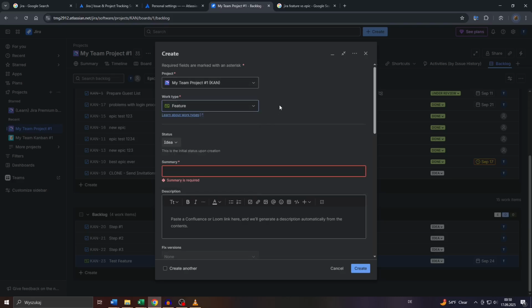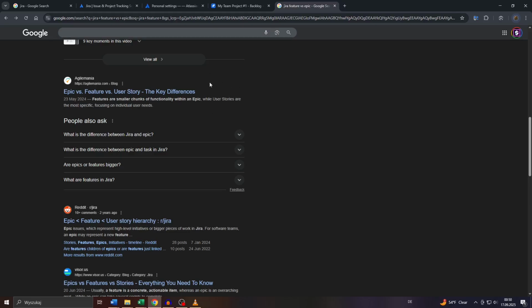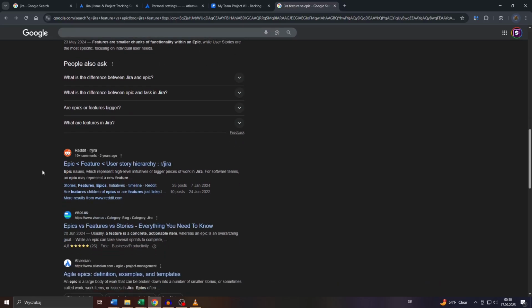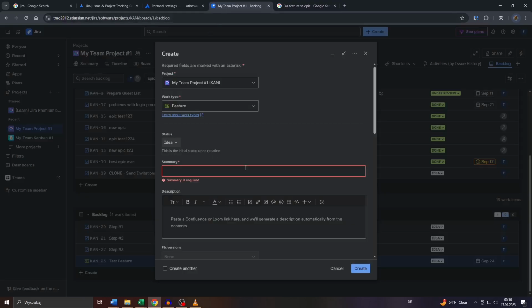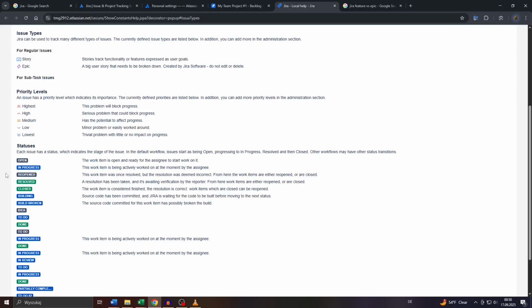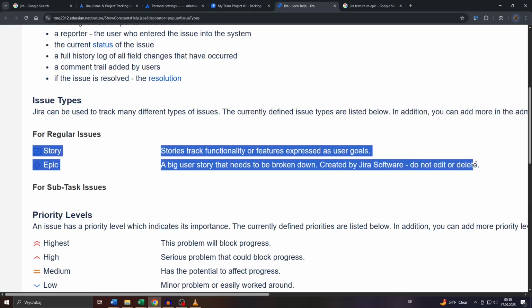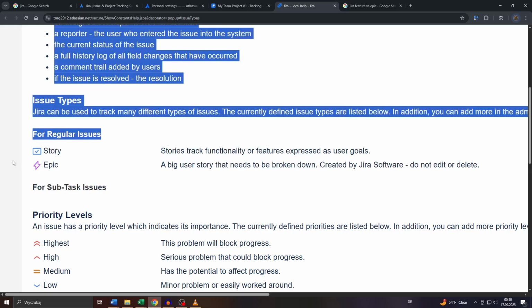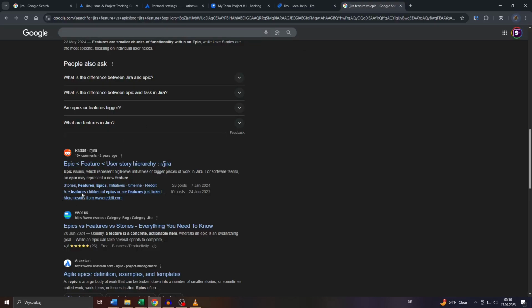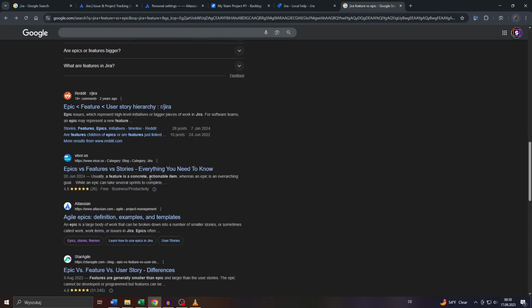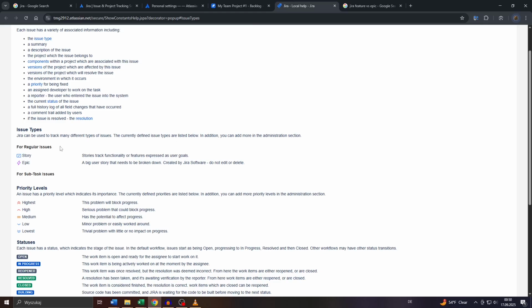Now a quick word of explanation, guys. What are features? Well, features are a work item within the hierarchy here on Jira that is basically smaller than an epic but larger than a story, or for example a task. Epics, for instance, can represent an entire project goal consisting of several sprints that need to be completed, whereas features on the other hand are smaller, according to this description here, actionable items. More about the feature's functions just in a moment in detail.